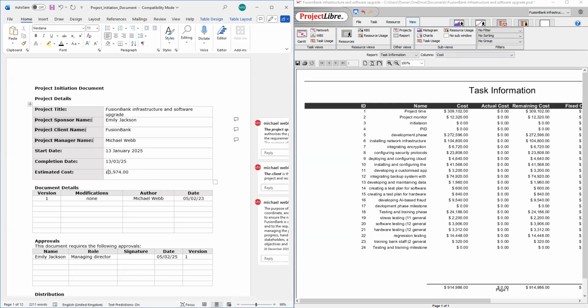So we're over budget, and this can be explained in our progress report: due to the regression testing that we had to do, it took us over budget. So we can do that when we go to paper B and explain the regression, the reason why we went over budget. Now, we've had this. So what are we going to do next?